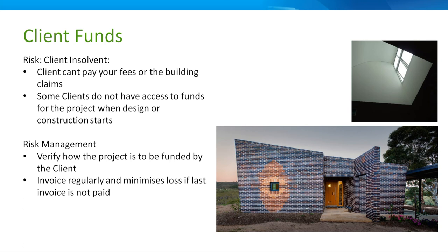Look, unless you're really good at costing, I've paid builders to price jobs. And builders, when they're pricing jobs for a cost estimate, are optimistic. And when builders price jobs as a tender, they're either desperate or they're going to put in fat. It's really hard to get the right costing. I work with my brother sometimes. He will do a 20-page cost estimate nail by nail. To get a cost for a domestic job and not spend the whole budget on the QS report, you could find a QS to give you advice.